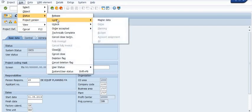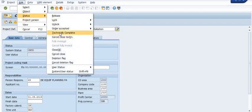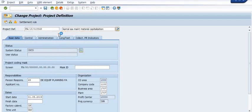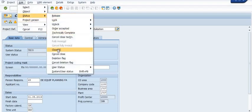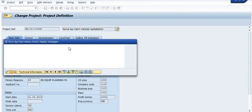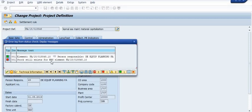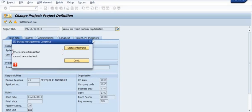In status, we set it to 'Technically Complete.' The whole WBS project system process comprises status changes: first you create the WBS, then release the WBS, and then you try to close it. The system will give you a warning that in the WBS there is stock that still exists.